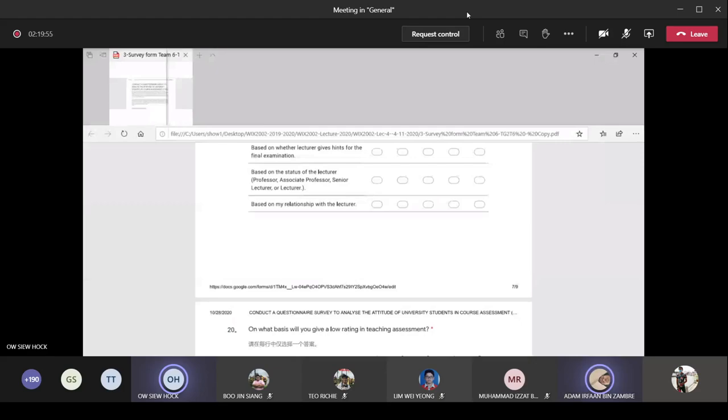So the estimating of project times and costs, we can already do it, because today you can estimate the time and cost for each. You break down to the lowest level, which is called WP. Just now I showed you the slide about the WP cost estimate, the page with labor cost and material. So you do one sheet for each WP. Use that one. Later, that will become part of your network diagram. That's why the arrangement of the project report is in sequence. You have to finish one, otherwise you cannot do the later one. So that is in the proper order already.